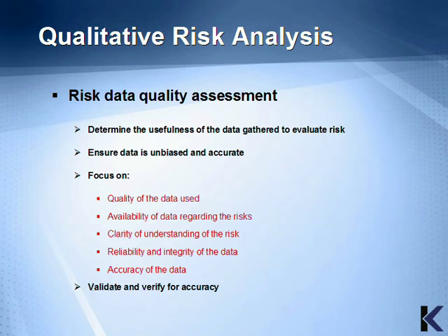The Risk Data Quality Assessment is exactly what the name describes. It determines the usefulness of the data gathered to evaluate the risk, and it ensures that the data is unbiased and accurate. It places focus on the quality of the data used, the availability of data regarding the risks, clarity of the understanding of the risk, reliability and integrity of the data, and the accuracy of the data. Basically, it validates and verifies all of the data for accuracy.